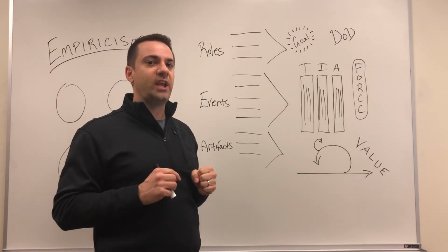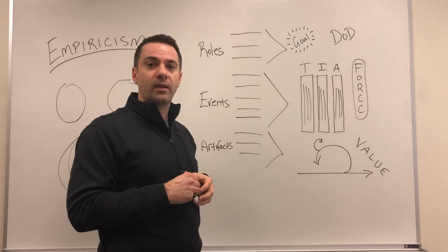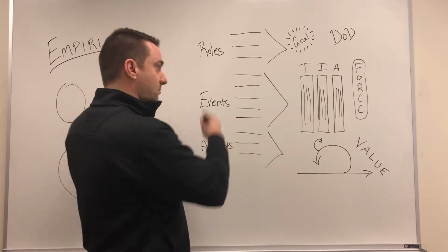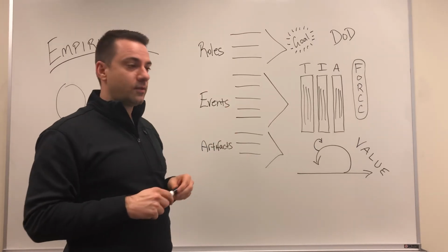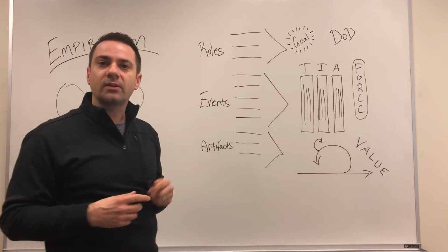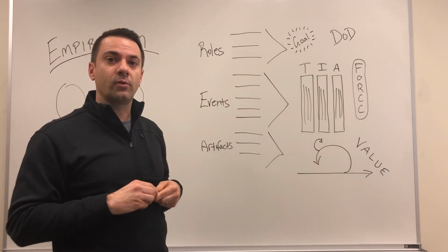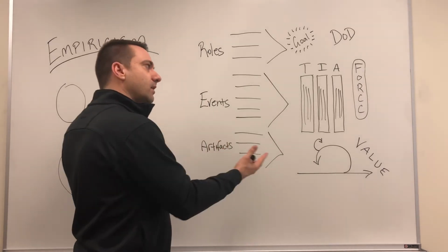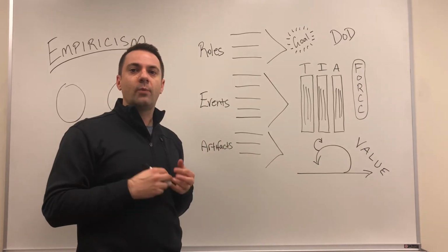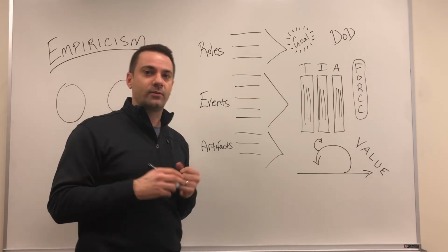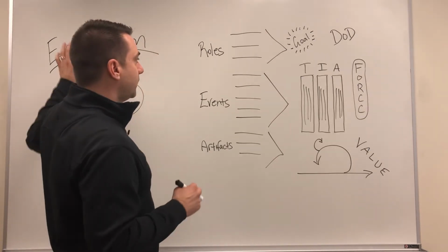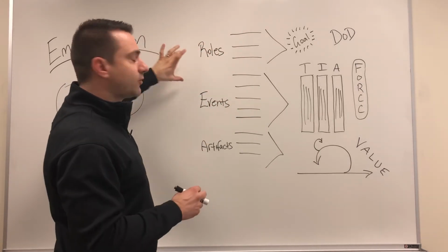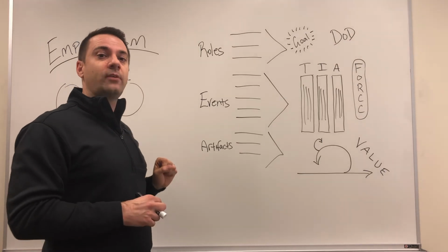However, when we needed to change order or when new items were added that were higher priority, it became physically difficult to change our product backlog visibly. And we inspected this. The product owner and I really kind of talked through how can we have a better system and what outcome can that have. So we inspected our product backlog, how it was, and we decided to try an experiment, empiricism. What we did was we formed horizontal rows with space under each row, and that space was intended for work.